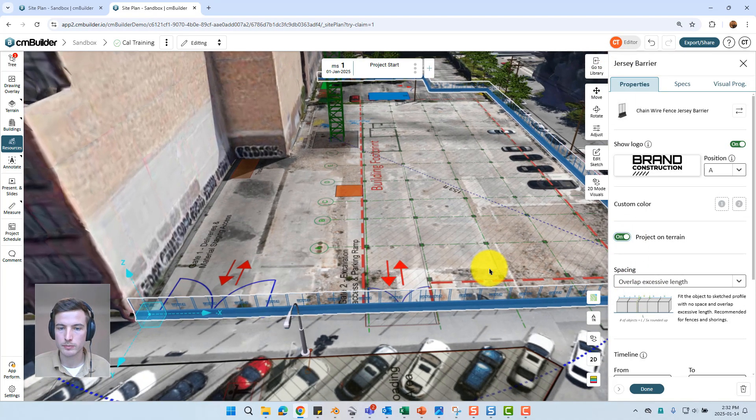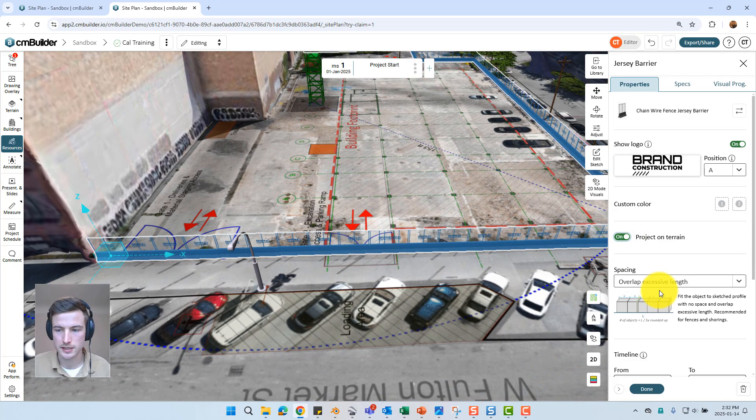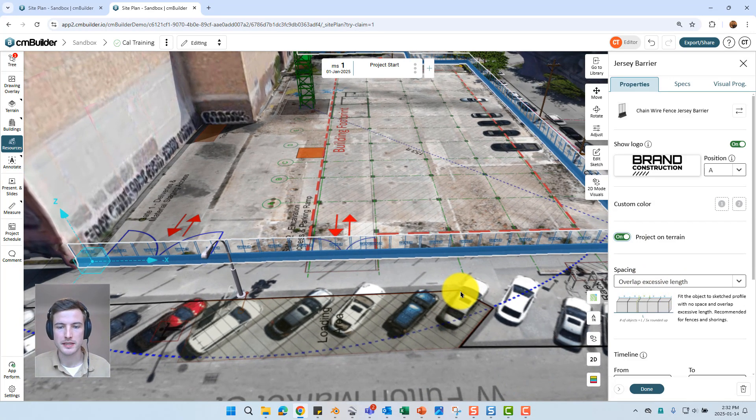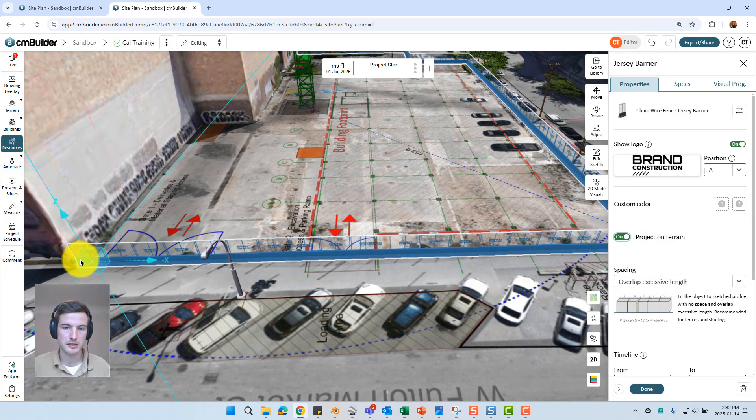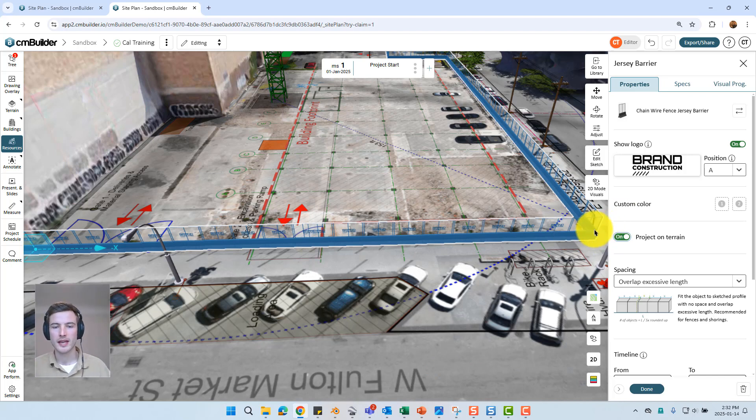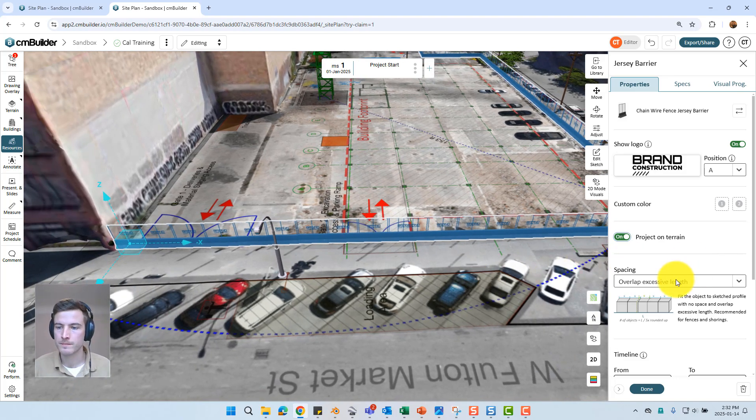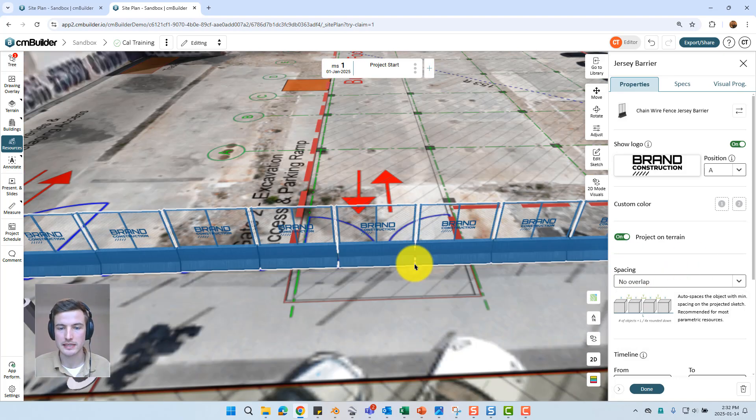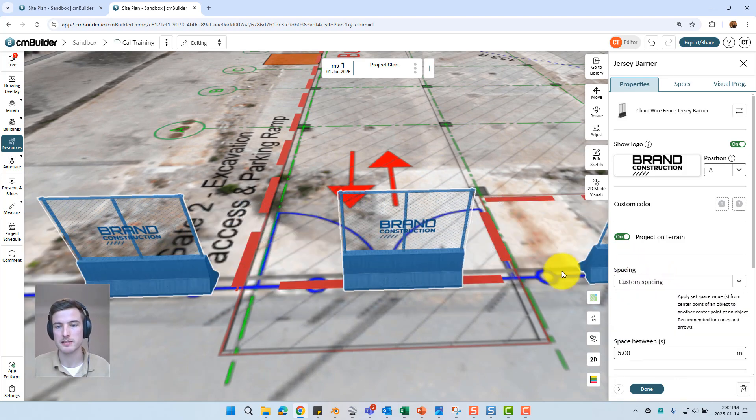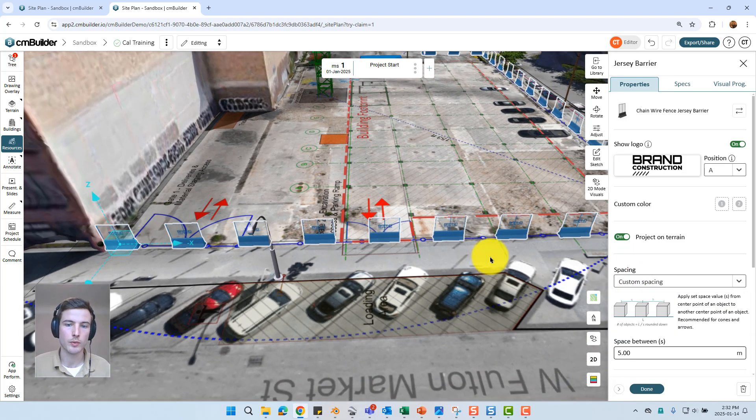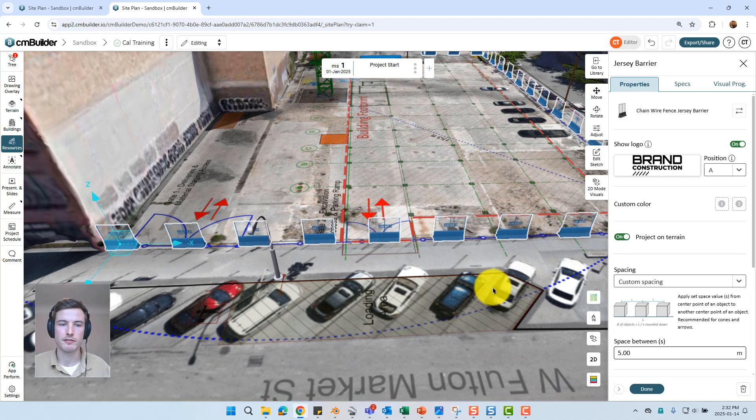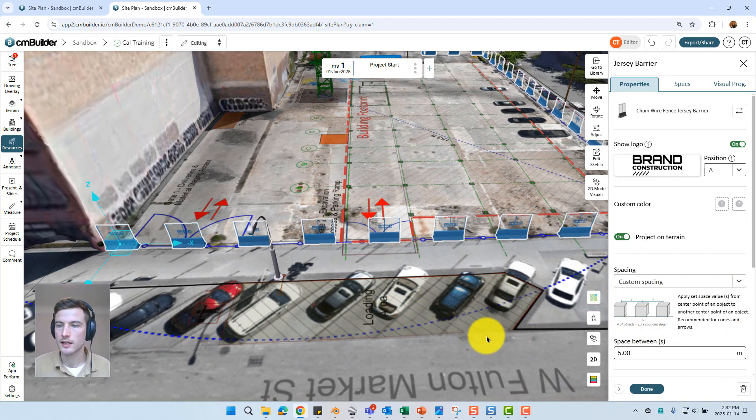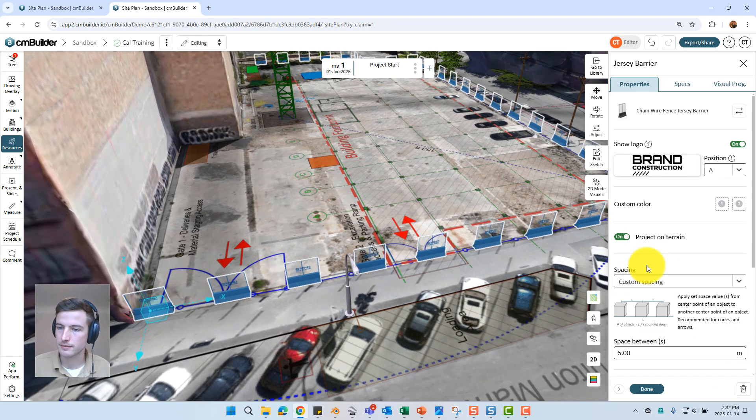We also have the spacing option. This particular fence is going to be overlap excessive length by default. That means it's going to calculate the length from this point all the way to this point. It's going to divide that by the panel width. Whatever little fudge factor there is it's just going to overlap the panel slightly to compensate. Or we also could use no overlap which is just going to leave a slight gap between the panels to compensate. Or finally we could do custom spacing. Likely not what you're going to want to use for a fence but for traffic pylons or traffic arrows. Creating a custom spacing can be a good way to achieve your desired aesthetic.